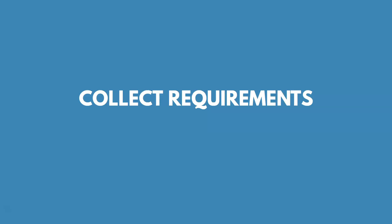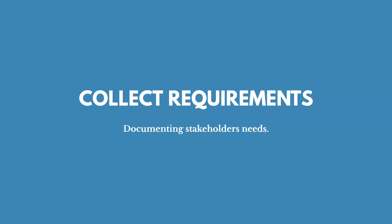After planning scope management, we start collecting requirements — documenting the needs of our stakeholders. The inputs include the project management plan, which contains the scope management plan and the requirements management plan, because those tell you how to collect requirements. You could also have project documents like a stakeholder register, which tells you who your stakeholders are — they're a source of requirements. Agreements can also be an input, giving perspective on what customers are expecting from the project, along with enterprise environmental factors and organizational process assets.